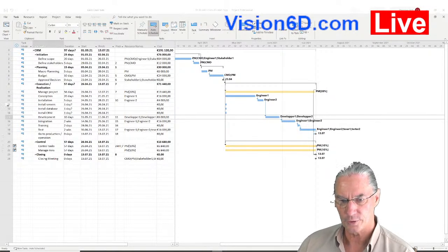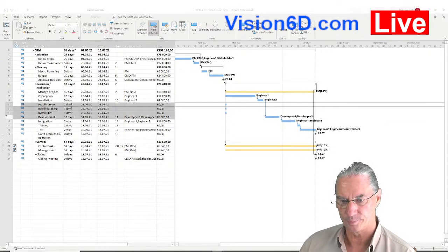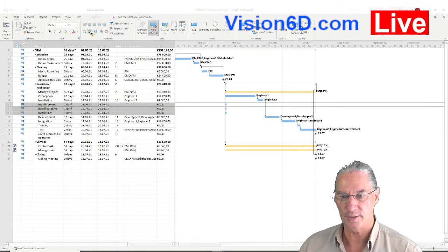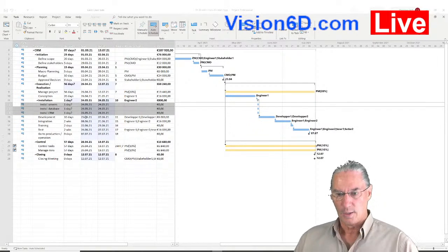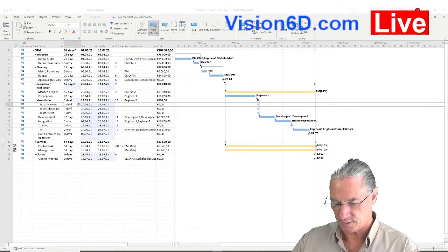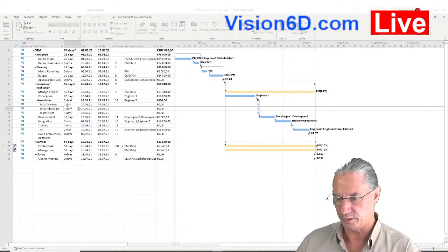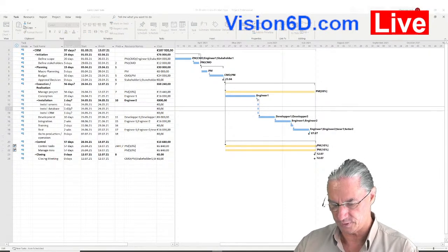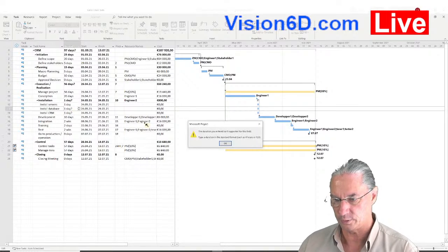Okay, all those tasks which are here are part of the installation. So I will insert them under installation, and for this I indent them. Okay? And I will say the following. This is a duration of 1 day. The database is also an installation of 1 day.